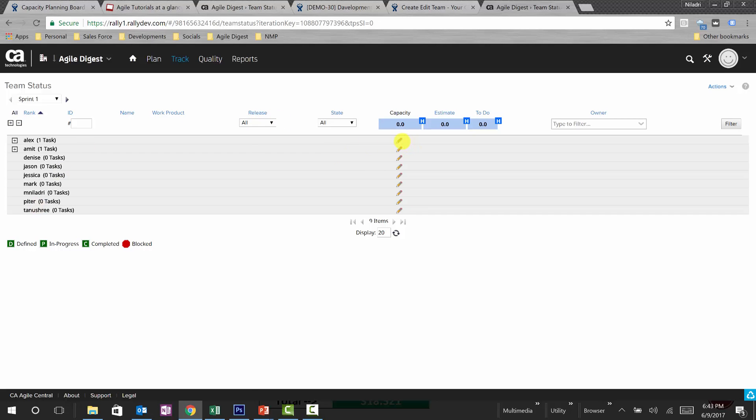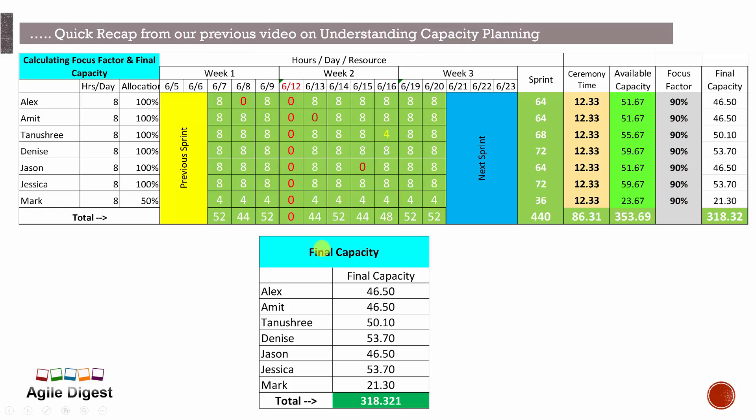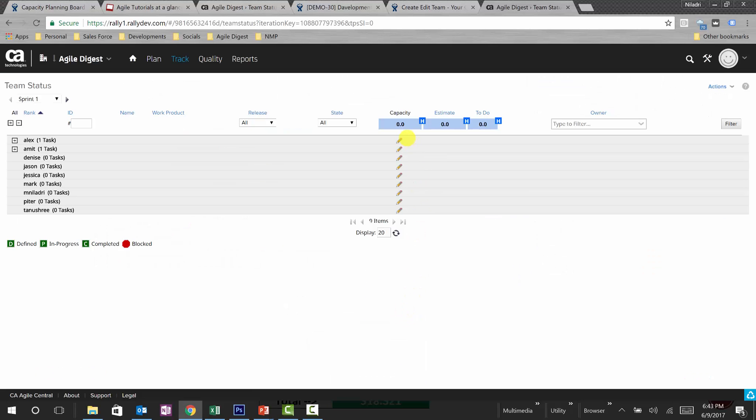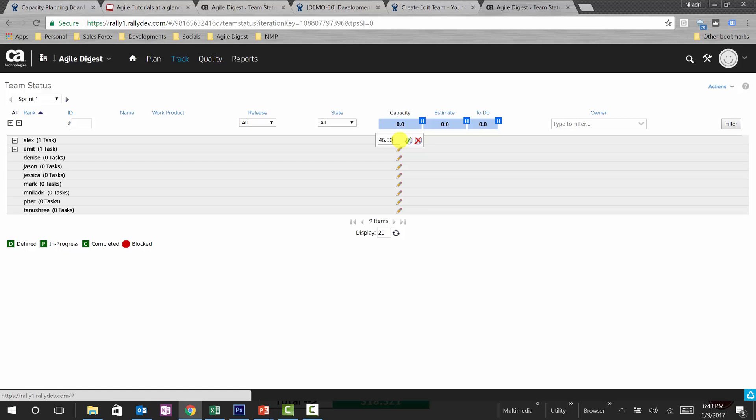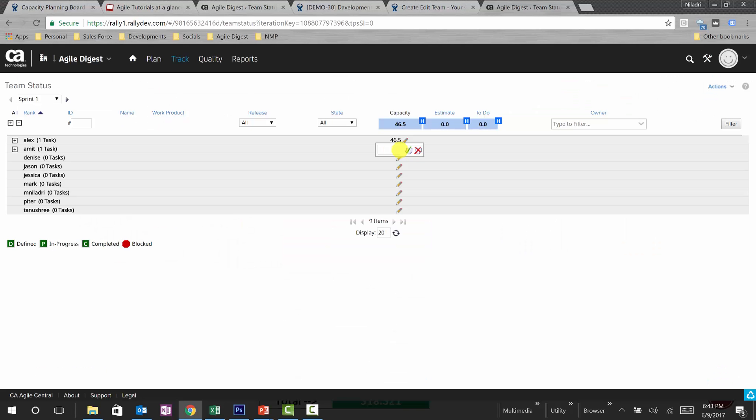And we'll be assuming, okay Alex, this is saying one task because there is one task I already have assigned to him. We'll go there later for assigning few more tasks and assigning hours, but the very first thing we'll be doing is for Alex, we know it was 46.50, so I'll update this hour to 46.50. Then I'll be updating the hours for Amit, it's 46.50 again.